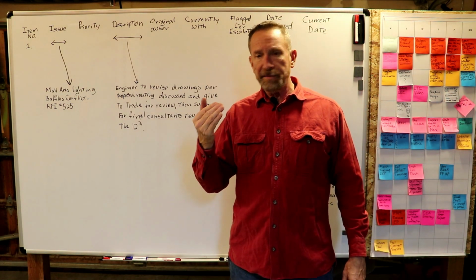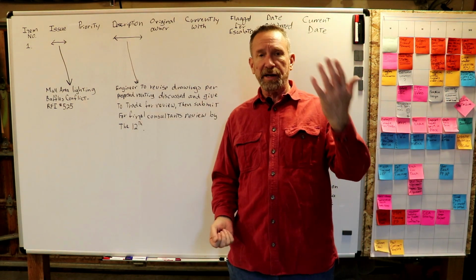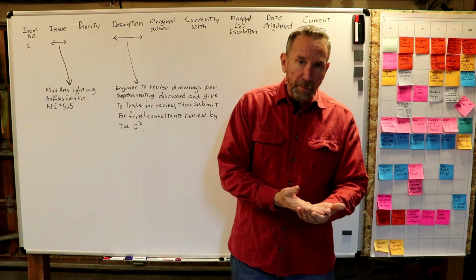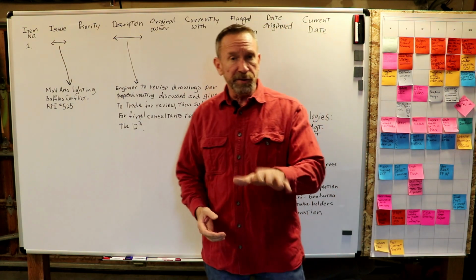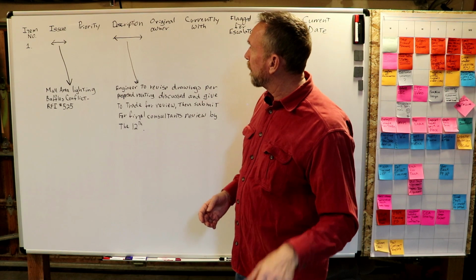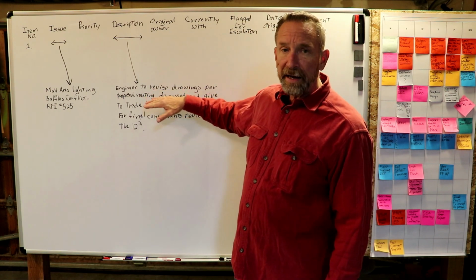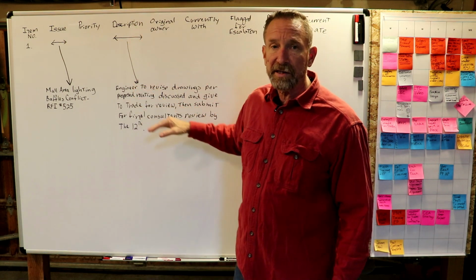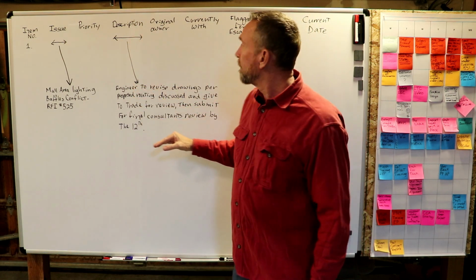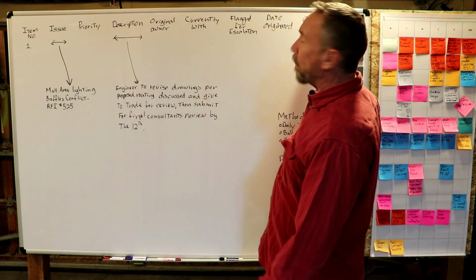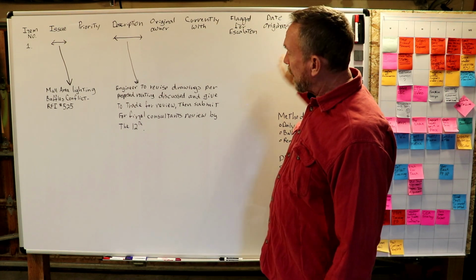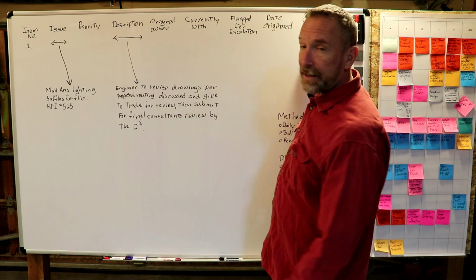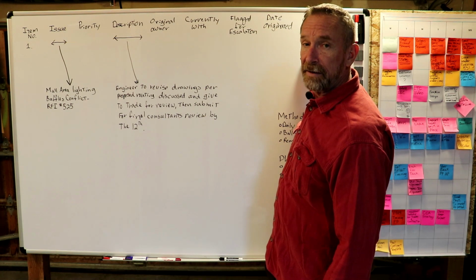They've got to have an alarm that goes off on their phone or something that comes up on their computer and says, open it now, review it. And they're doing something very specifically when they do that. They're coming over to any open issues. They look in the description field to see precisely who has it and when they're going to have it done. And they check with that person to make sure that they're tracking to get it done.